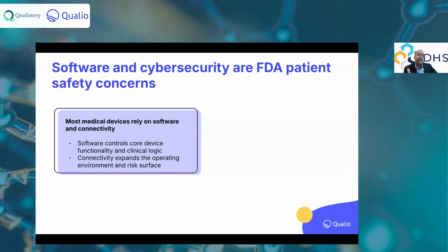Now, you don't need to own that code, but you need to do risk analysis on the use case for that code towards your device. For example, if you are using a large library that may do a bunch of things, but you're using it for, say, storing data on your storage chip, you would need to do a risk analysis on the SOUP for those use cases.